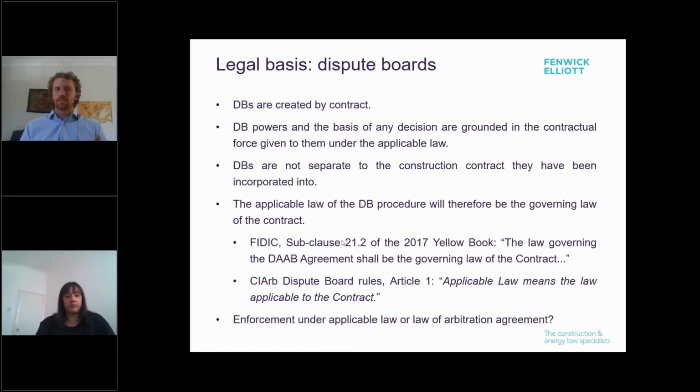Naturally, this also means that dispute boards are not separate to the construction contract that they've been incorporated into, unlike arbitration agreements, which are separable. And fourthly, it also means that the applicable law of the dispute board procedure will be the governing law of the contract. And this is explicitly stated, for instance, by FIDIC and the Chartered Institute of Arbitrators, CIARB, as shown